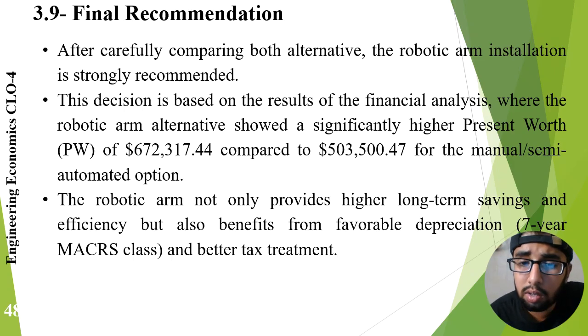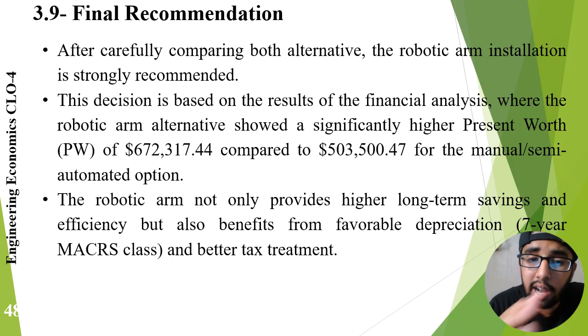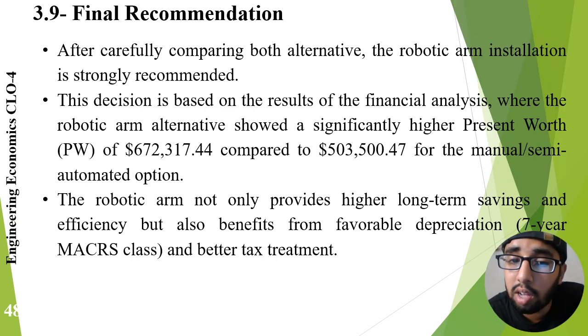The robotic arm has higher long-term savings and efficiency, but also favorable depreciation under the 7-year MACRS class and better tax treatment, with a present worth of $672,317.44.